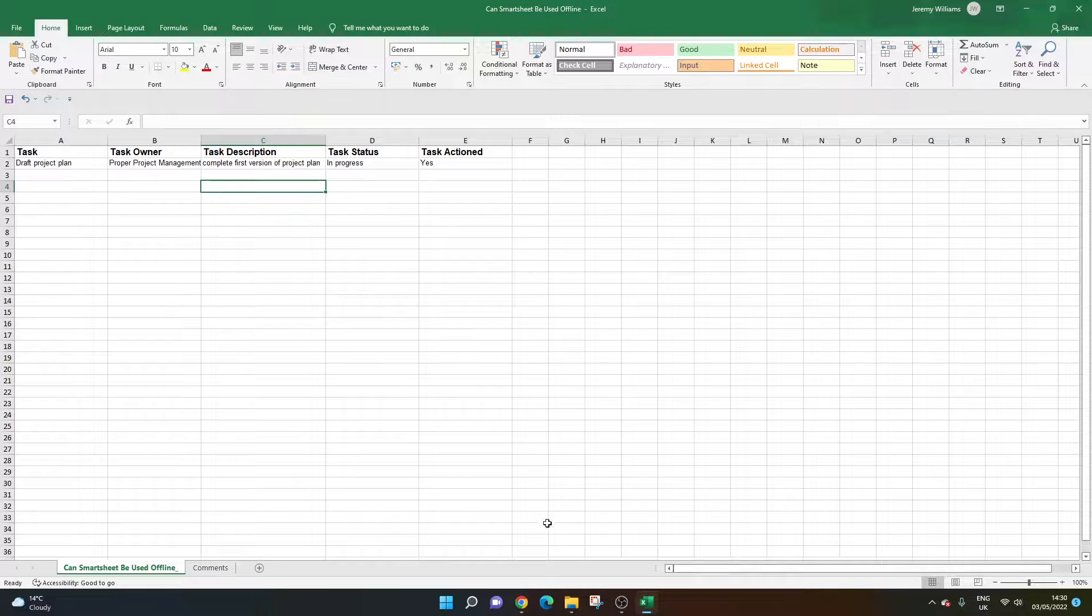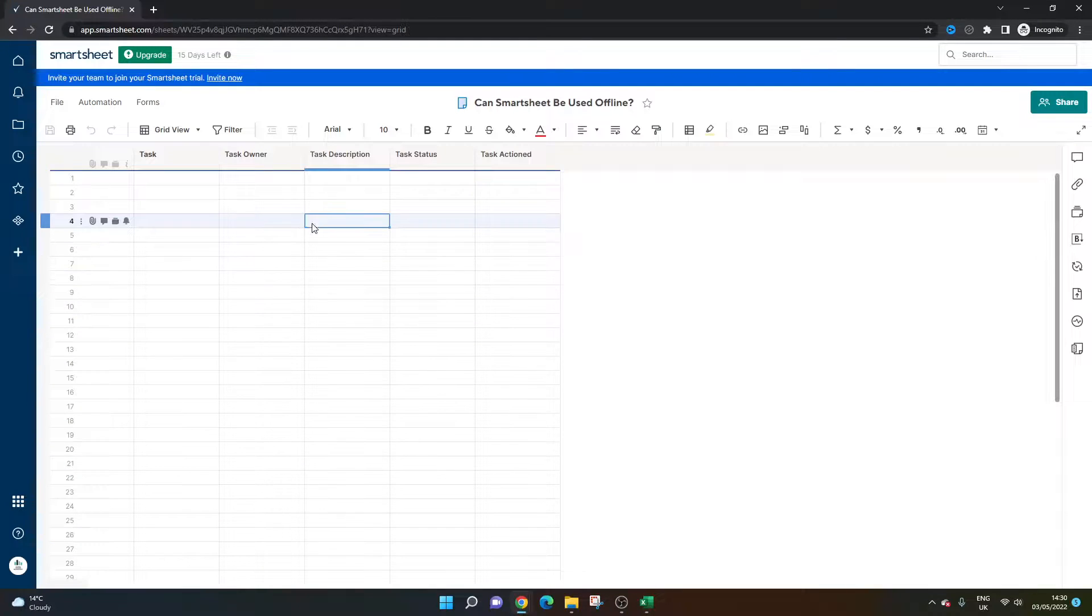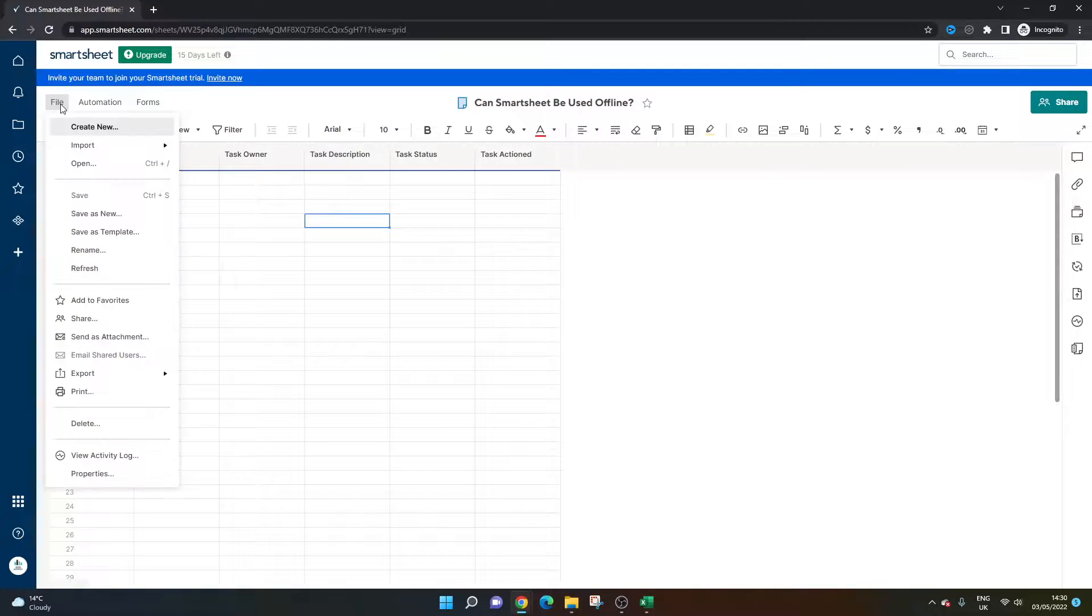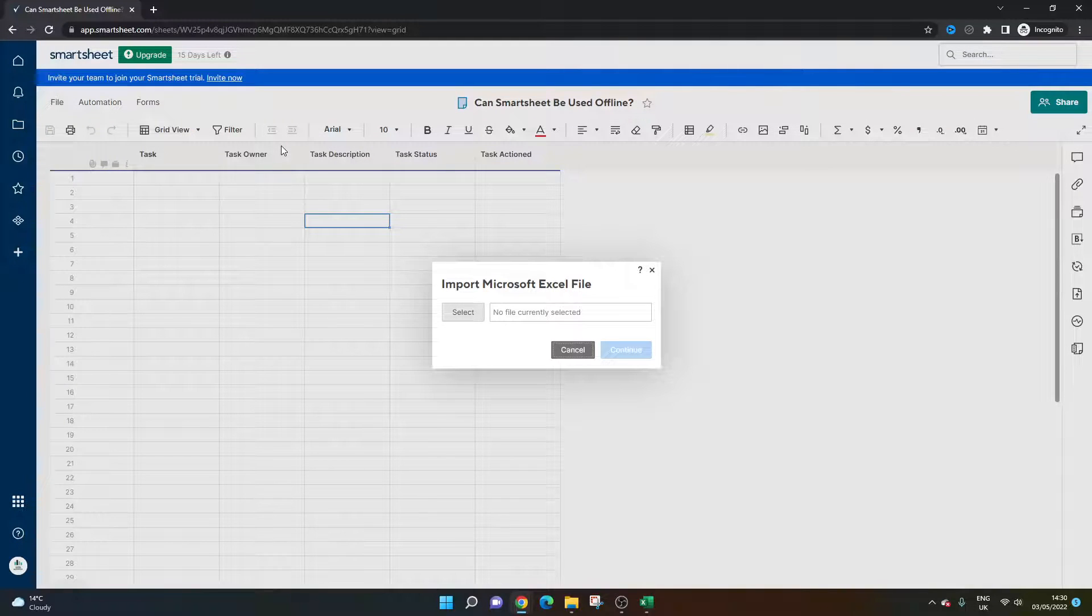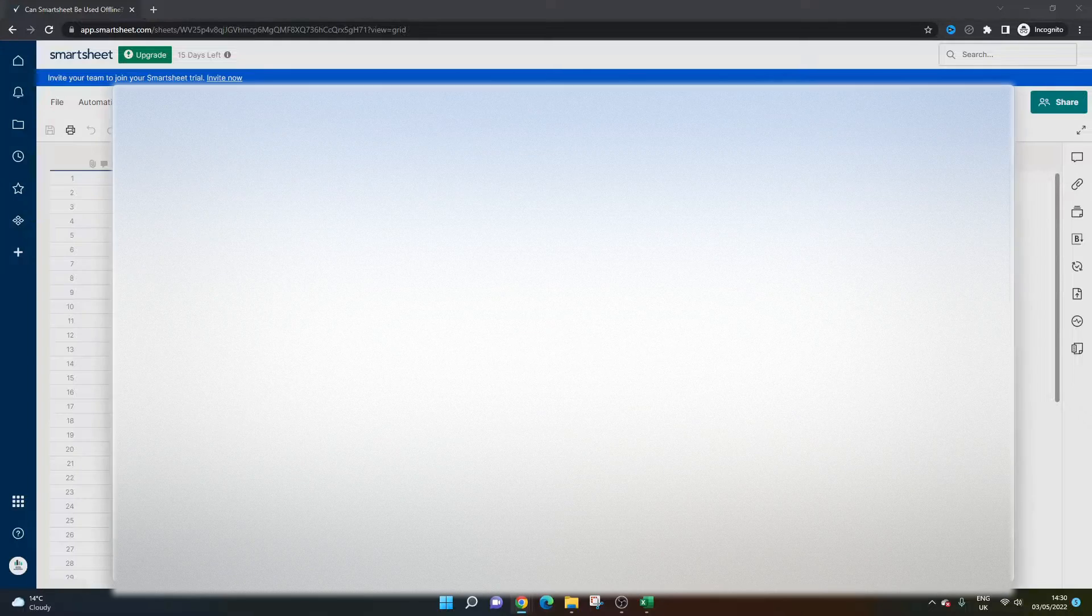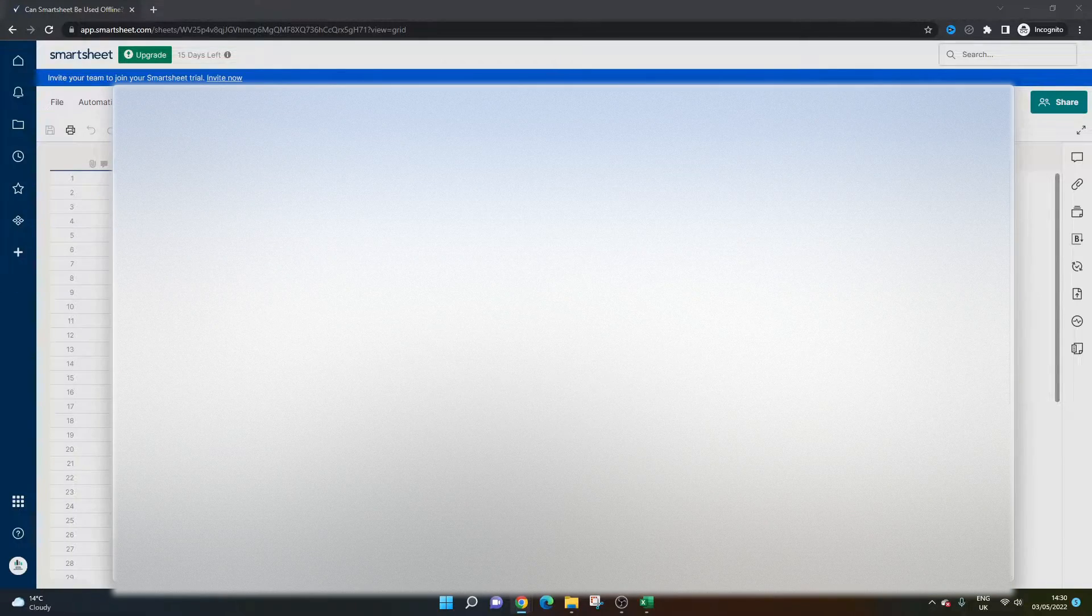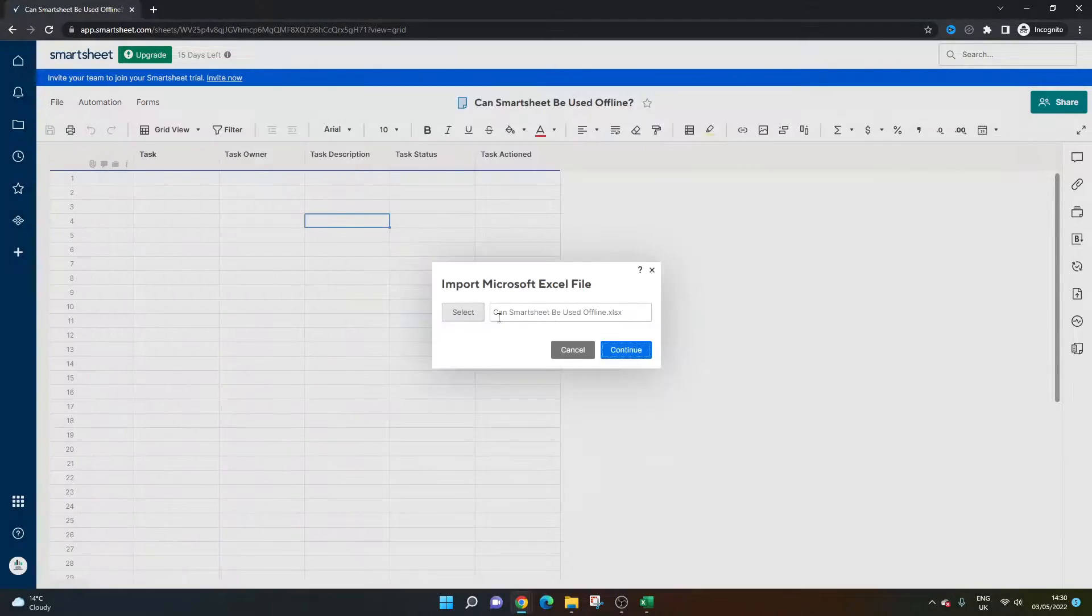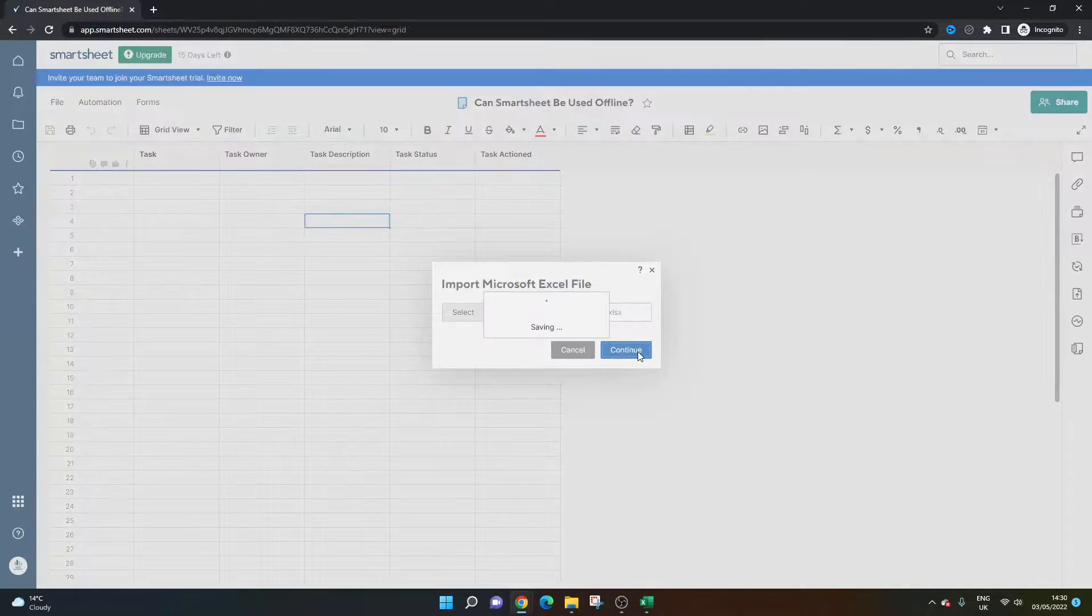What you would do when you have access to Smartsheet again is go into the sheet, go to File, Import, Import Microsoft Excel, and select that file you've been working on. Find it, make sure it's there, and press Continue.